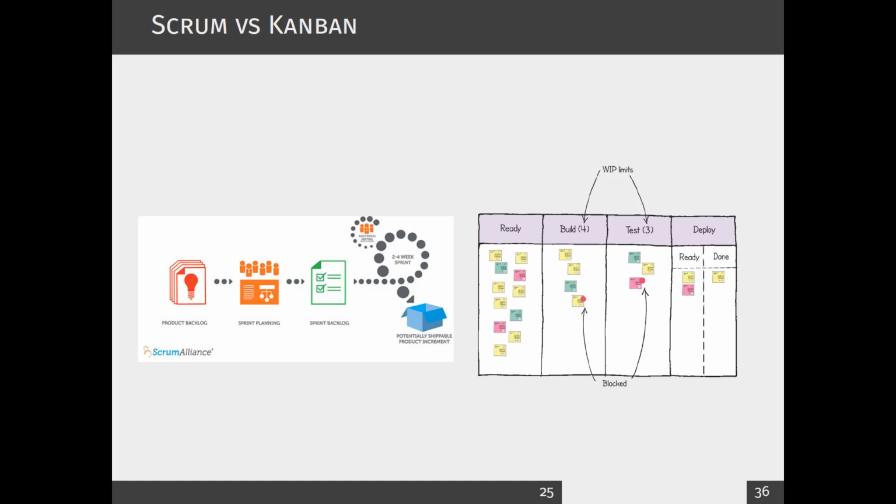So, for example, Kanban is, they say, to improve the system through visualizing their work, especially their work in progress, right? So the idea is you start with what you do right now, and then you agree on a particular change, and you try to finish, and you try to limit the number of existing work items allocated to you, right?